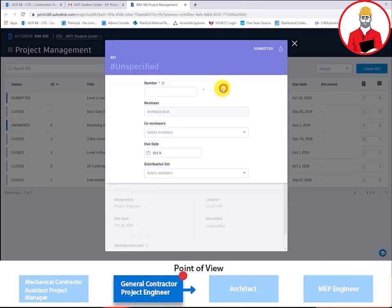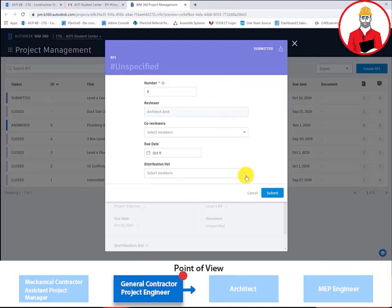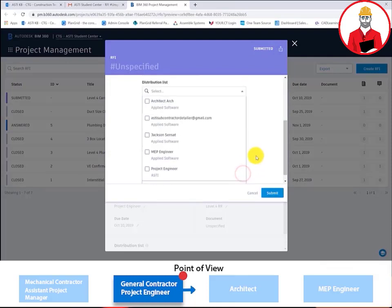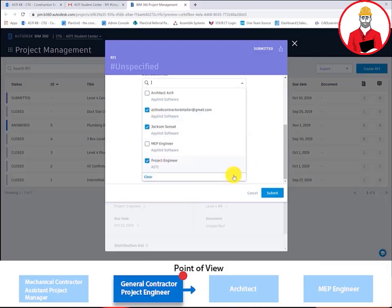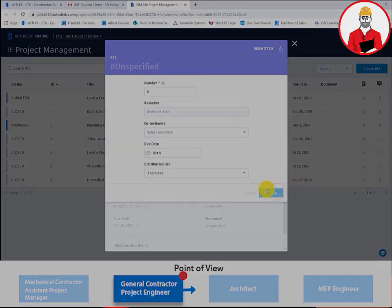The project engineer now gives the RFI a number, reviewer, a due date, and then assigns the distribution list for when the RFI is closed.